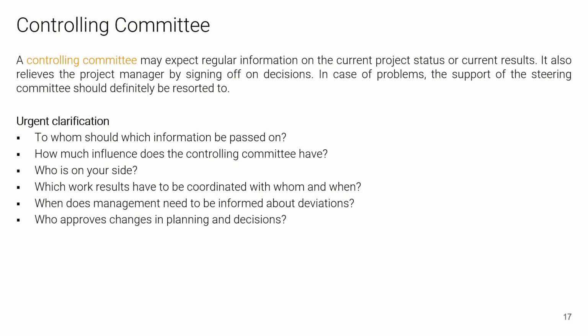Imagine you decide to take a certain Unity version for the project development. This is called a software freeze. During a development phase, hopefully no one will get the idea to change tools during development. This can cause extreme conflicts.